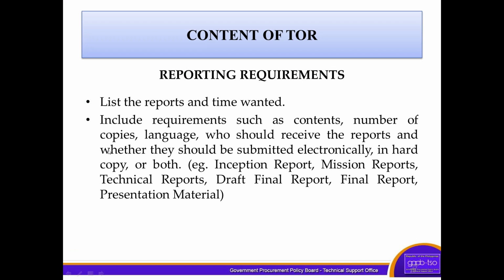So moving on, we have the reporting requirements. These requirements could become part of the basis of your payment to your consultant. It contains the list of reports and the time wanted.